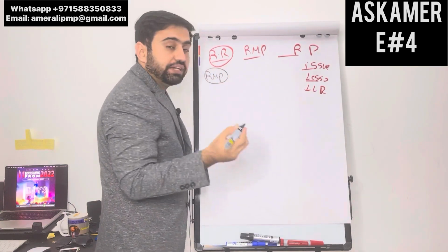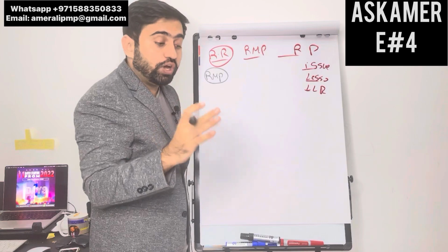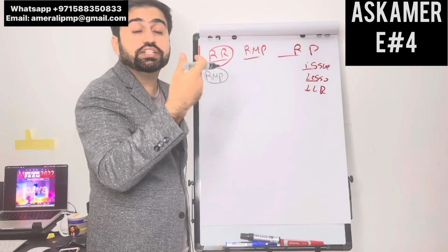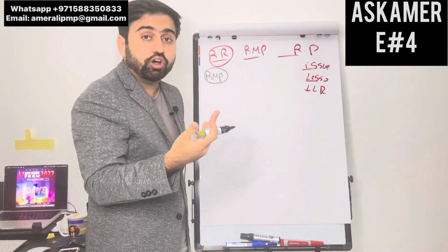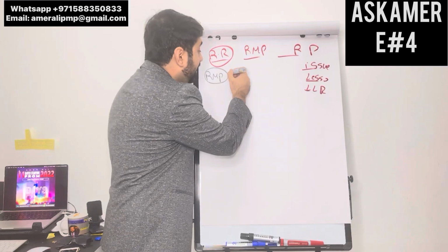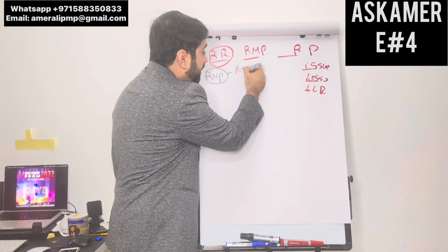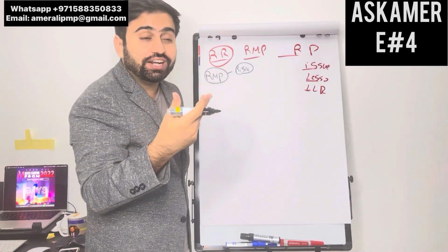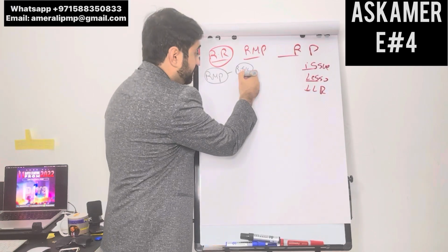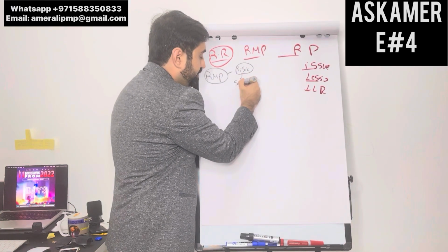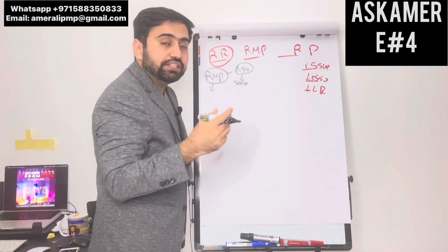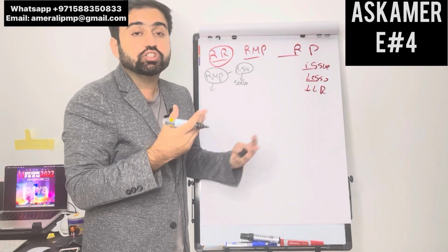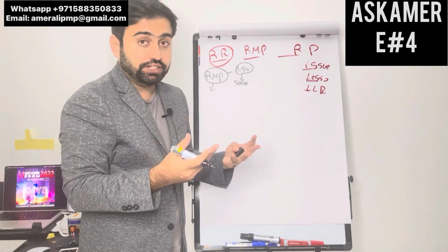It is a management plan that defines how to handle the project. What are the things that you need to consider while doing the risk assessment? What is the process of the organization? And it understands the risk appetite, tolerance, threshold of stakeholders. These things regarding stakeholders. It also tells us whether your organization is risk averse, risk seeker, or risk neutral. How does your organization actually perceive the risk?